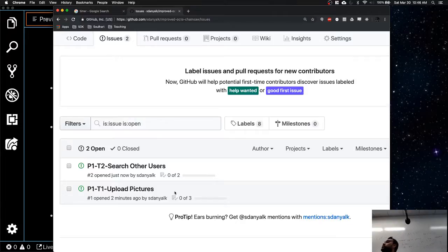Exactly, yeah. You can divide these stories as small. I would suggest keep it as small. But yes, divide into back end and front end. Excellent. I want to research the API. That's another task. I would say start with one person. That's the ideal. Can one person complete this story? If not, if one person cannot complete this, break it down. How can I make sure that one person is able to complete it? That's a really good point. Yeah, excellent.